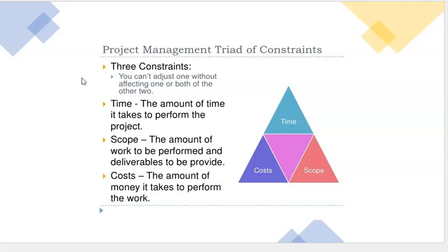But things happen and they had to adjust their timeline anyways. We were able to decrease the time it took. The painters were willing to come in on Saturdays and get some work done a little bit earlier. So we were able to reduce that 30 days significantly and still get the building up and running over the timeline that we had originally discussed, but it was very minimal.